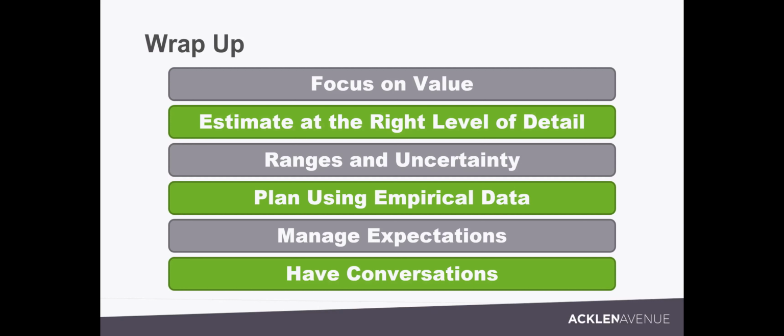Plan using empirical data. When I make these plans, the team is helping me estimate, at least some representation from the team. And my teams are long running. So I have data on it, it usually takes about 4 to 6 weeks before they hit their actual run rate. I can use that data, even though they're doing a different client, because it's usually within the same kind of work, mobile or web. So I at least have some good empirical data to use. But then the second they actually execute, the first 2 weeks in, I rebuild the plan with their actual data.